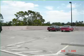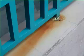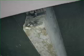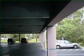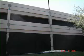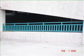During the initial inspection, we discovered quite a bit of deterioration of the stucco, railings, fixtures, and also found evidence of water intrusion from the deck above, which was starting to compromise some of the structural elements below. After installing the scaffolding and tenting off the work area to ensure a safe working environment, the team begins to repair the perimeter of the structure and the ceiling of all penetration areas. Our main priority is the safety of the crew members, general public, bank customers, and staff.